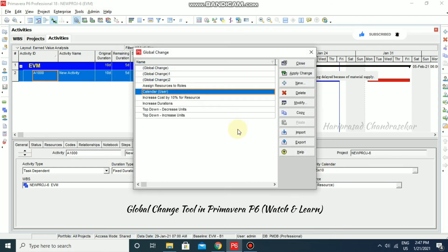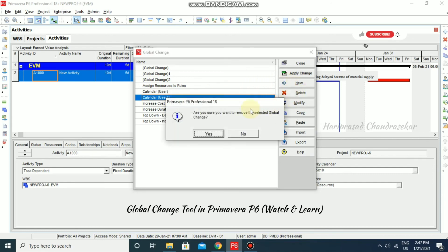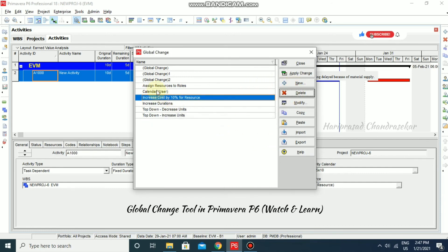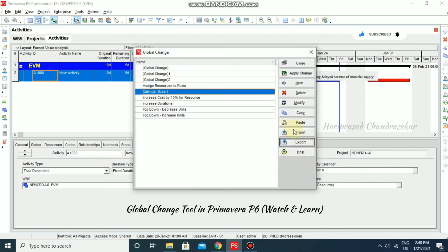In the Global Change tool, we can use Update Change, New, Delete, Modify, Copy, and Import/Export. For example, you can copy a global change and paste it to get two copies, then delete if not needed. You can also export in .pcf format, save it, and import it into another project in Primavera P6.